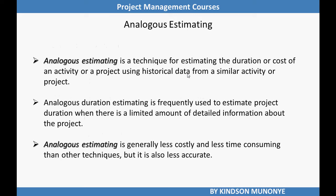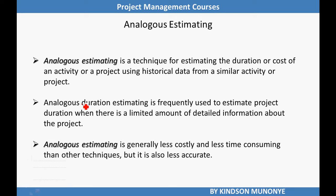Analogous estimating is very important. It is a technique for estimating the duration or cost of activities or a project using historical data from a similar activity or project. Analogous estimating is used to estimate project costs when there is a limited amount of detailed information about the project. We also used analogous estimating during estimate activity duration under the project time management knowledge area, and we are also using it to estimate activity costs here. One thing you should know is that it is less costly and less time consuming, but also less accurate than other techniques.